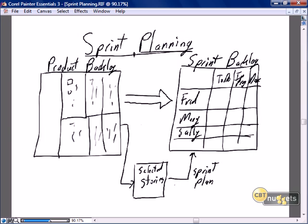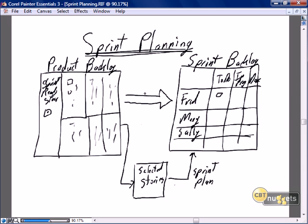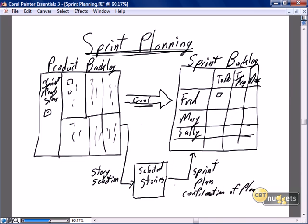The main focus of this nugget is the sprint plan. The sprint plan involves selecting sprint-ready stories from the product backlog — taking them off the backlog and saying this story is assigned to Fred. To accomplish this there are two steps: story selection, and confirmation of the plan. So let's talk first about story selection — how does story selection happen?